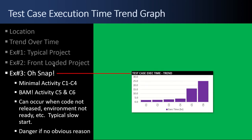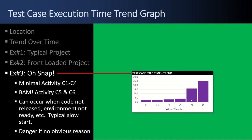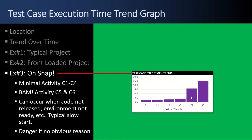Example number three, oh snap. You had minimal activity cycles one, two, three, and four, and all of a sudden it exploded at the end. Now that can occur when there's no code release or the environment's not ready. Then really what you're saying is throw away C1, two, three, and four. But if that's not the case and it's just a slow start, uh-oh. You're in a world of hurt because you shouldn't be hitting all this risk here. You should have this bubble earlier so that you're tapering off. If you're here and you have all this work and anything goes wrong, you don't have any buffer.